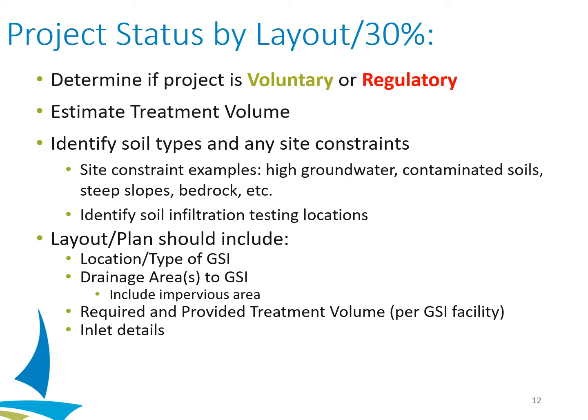In order to help facilitate successful projects that meet the new stormwater ordinance requirements and are designed to our standards, we've set up milestones and recommendations for what items to check off at each point in design. We are formalizing this into a standard checklist that we would expect to be completed on all ordinance projects. For now, I'll give you an idea of what types of things we're expecting at each stage. First, basically at zero percent design, we'll want to understand if the project triggers the ordinance, because that will follow a different series depending on what we determine.